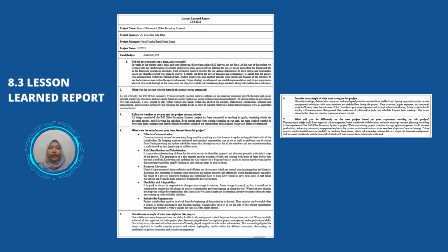Next, a lesson learned is a valuable insight gained from completing a project. So lessons learned involve, first, identifying success and failure, recognizing what worked and what did not. Second is analyzing the cause, understanding why things happened the way they did. Third is documenting insights, recording these insights for future reference. And fourth is applying knowledge, using the lessons to improve future projects. So this is our lesson learned.